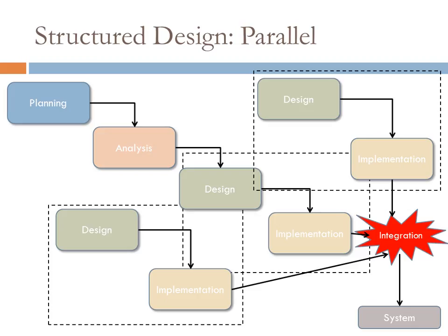So if you're going to do something like this and do it well, you want to make sure there's careful coordination across the development teams that are actually building these different subsystems. Make sure that they're using the same standards. Make sure you have agreement on specific platforms that are being used. That way, when you get to this integration phase, it's easier to put these pieces together. So that these systems work in tandem with each other and present hopefully a consistent interface to the user. So for the user, it looks like just one single system.